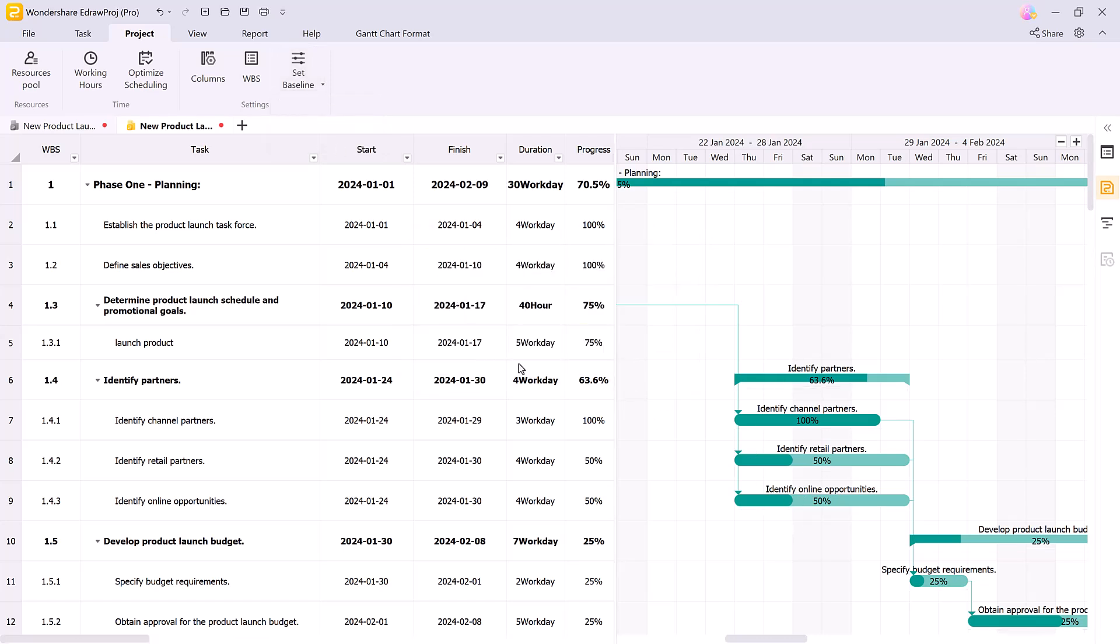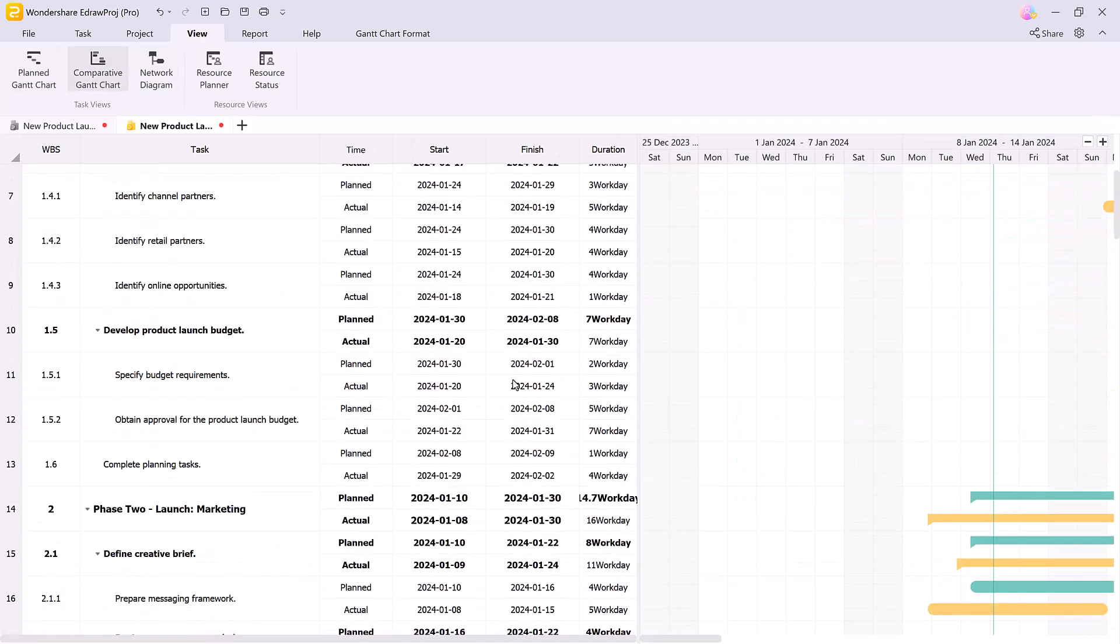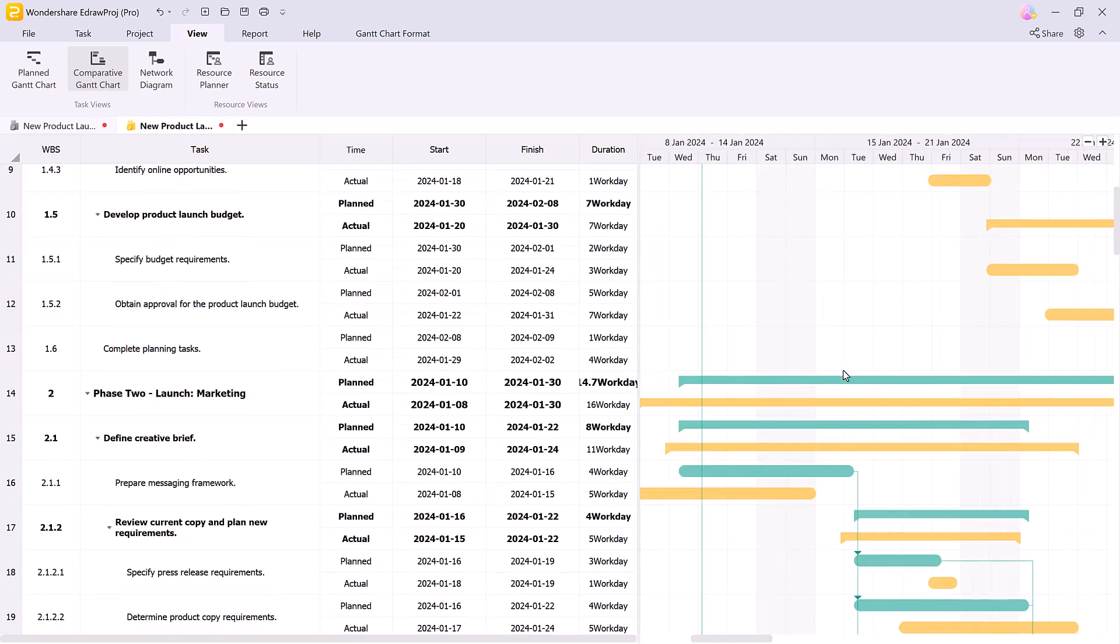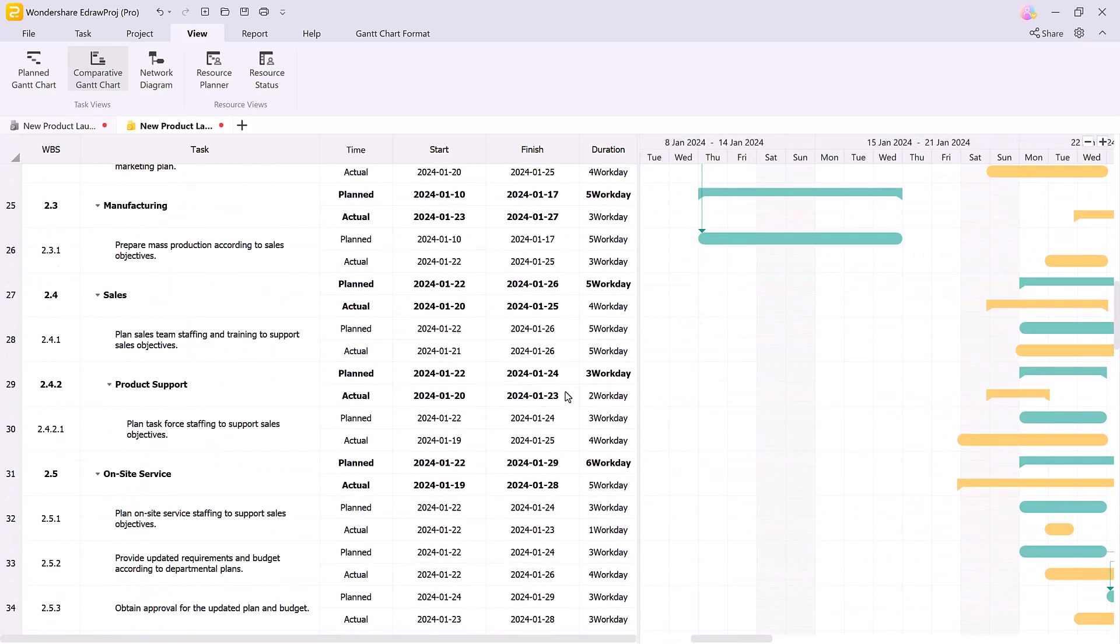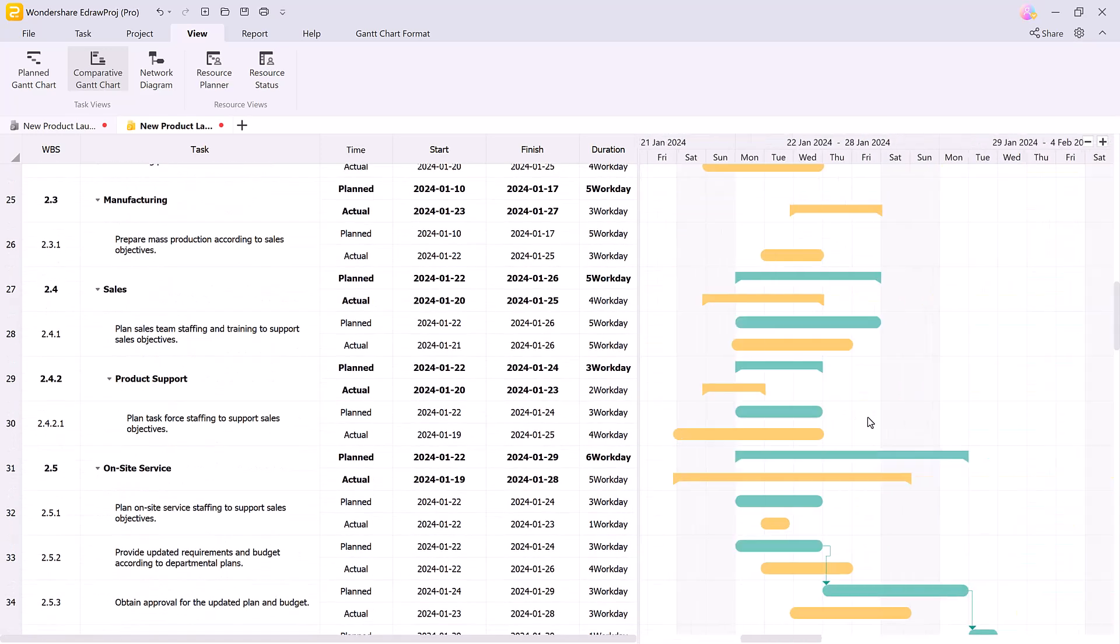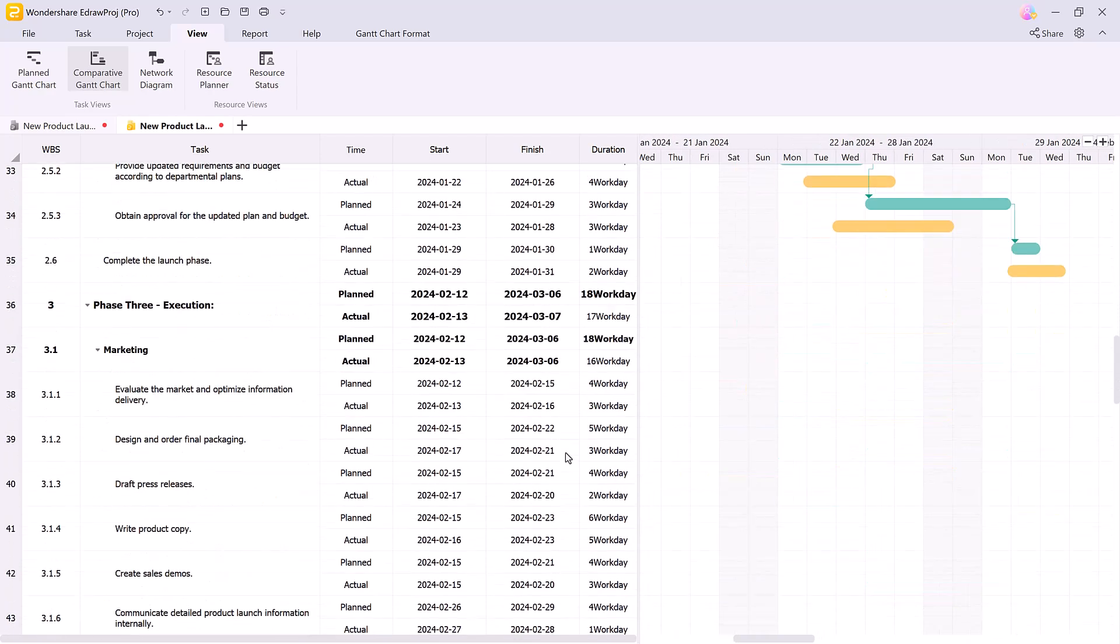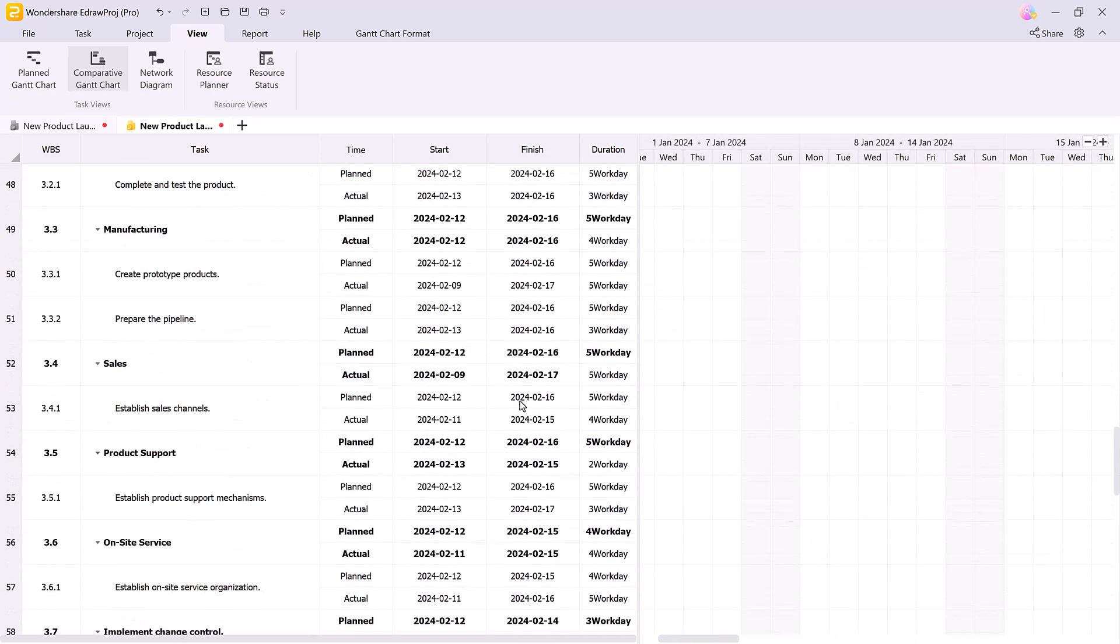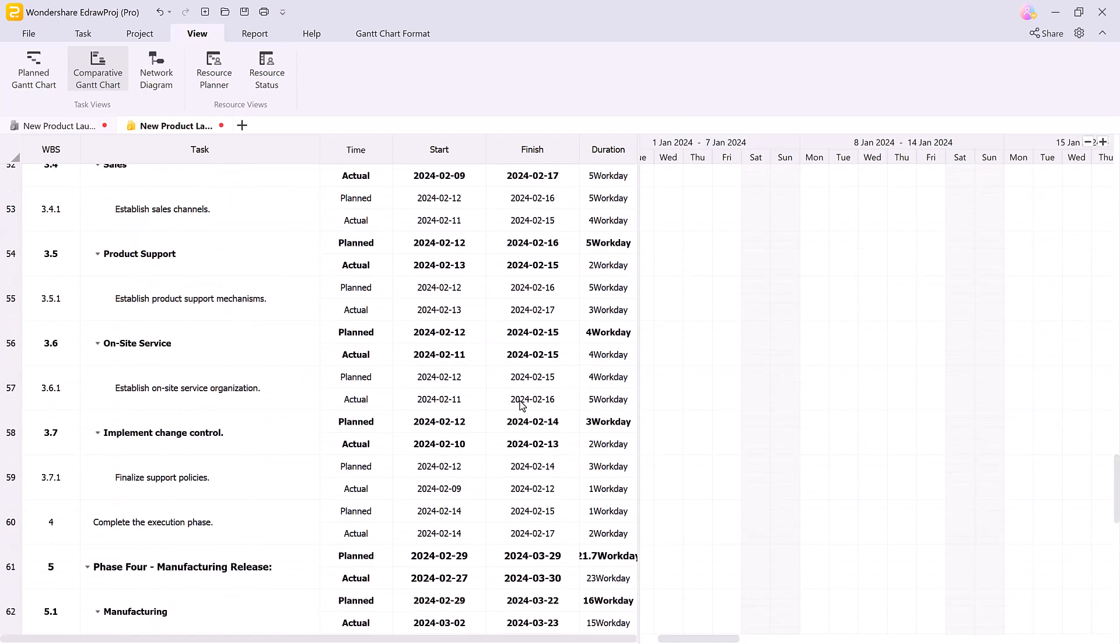Edraw Project has an excellent visualization system. In the view tab, you can switch between different charts such as comparative Gantt charts, which allow you to see differences between the project plan and actual progress, helping you adjust the pace as needed.